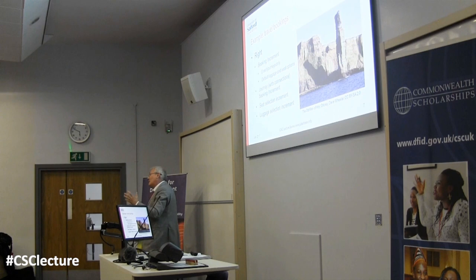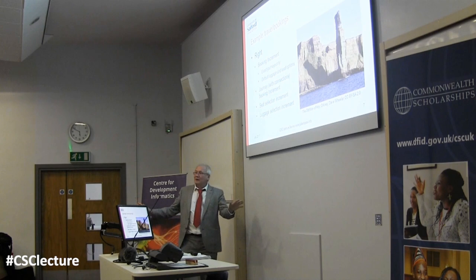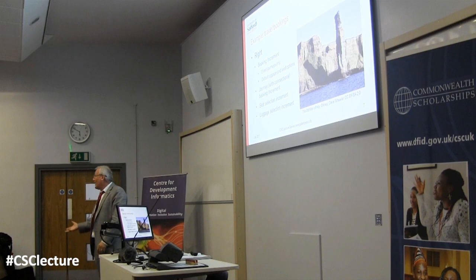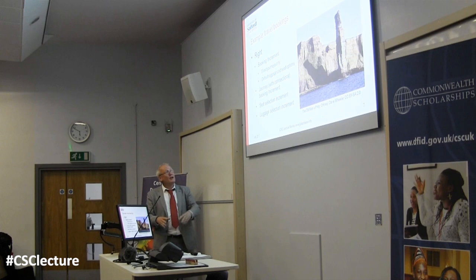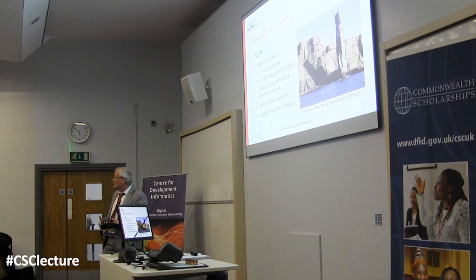And what they did on this particular railway booking system was they just made a simple booking of direct journeys from one place to another, without any worry about seat allocations or power or sitting next to the window or whether you had luggage or how much luggage you had. So you can boil it down to a very simple thing. In the very first increments of this system, you didn't even have to pay. Obviously they're not going to give this to the public, but you can build a booking system that doesn't actually require any payment stage. So you can simplify things.